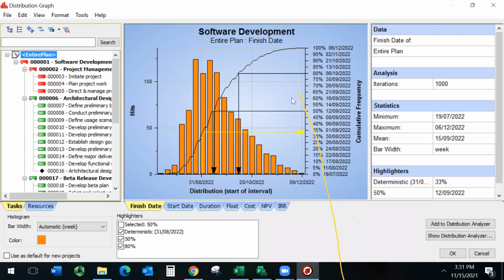So in your instructions, if you scroll down, you'll see criticality index. The criticality index allows you to identify project activities that are likely to cause project delays, right? Project management textbooks ask you to focus on those activities. And the question is, how do you find them? Well, the criticality index provides you with that information.